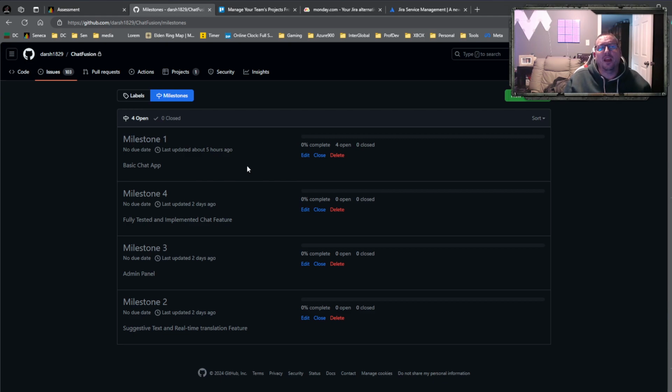It's not like somebody asks you, so how complete are you? And you're like, based on my experience, I think we're about 37% done. And they're like, where did that number come from? You're just dropping it off the top of your head, okay? This actually gives you a number with some mathematics behind it to say, yeah, we're 37% done. All right, we have 300 tasks. We have completed 98 of them. There's our percent. Okay, so the number I just said, I think it's around 32.5%. But anyways, yeah.